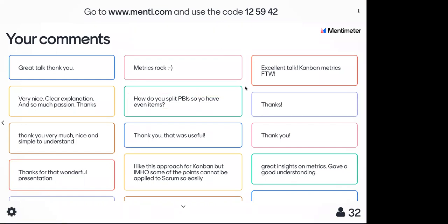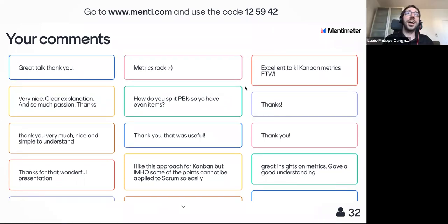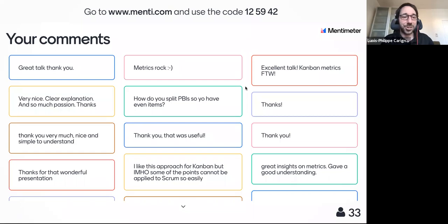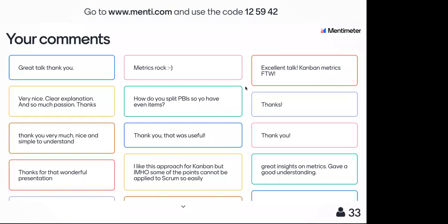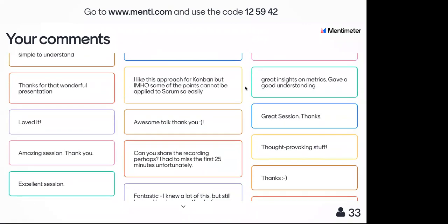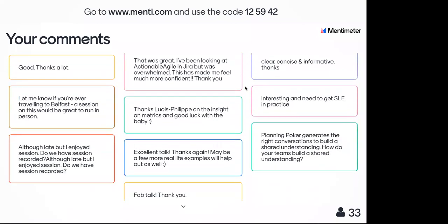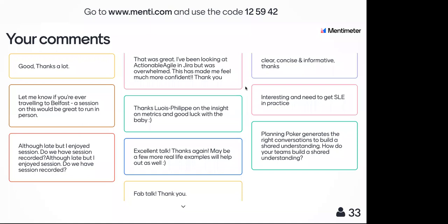A question: is there a free tool that does Monte Carlo simulation? I use my own code — after this talk Jose will share my contact info and I can point you to some code on GitHub. Otherwise Actionable Agile's Analytics tool is great. I'm also looking to build one called Pacemaker later this year. Troy McInnes has an Excel-based metrics tool where you load data in and it does a lot of this stuff as well. For how many data points you need for Monte Carlo throughput metrics: 12 data points in theory — or rather 12 days worth of data, since we're using throughput. Items going back in the workflow do skew the metrics; we try to avoid this and have a conversation about why we need to take it back.